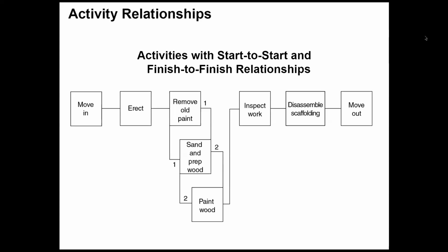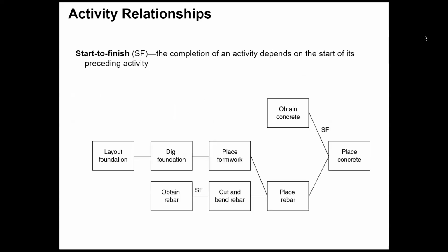This delay number 1 day is actually the same as this delay number 1 day, right? And this number 2 day and this number 2 day. If you have this in 2 sections, that means doing 1 section will cost about 1 day, and then this activity will cost 2 days for 1 section. It can look more complicated and give you more information, but it will cause misleading or calculation difficulty, right?